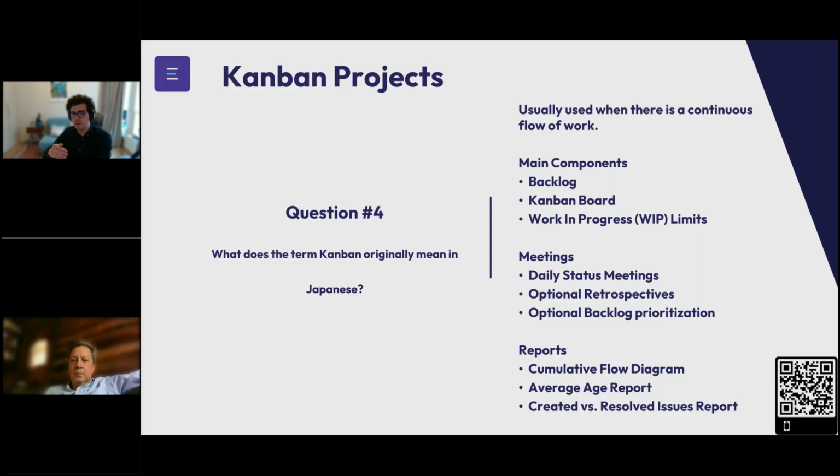Somebody comes into your company, there's a new joinee, you get that person a laptop, you get access to the building, you get access to some of the tools, to email, you create an email account, and there are certain steps that you need to follow in order. That is a continuous flow of work, and that's why I think you should use the Kanban methodology.